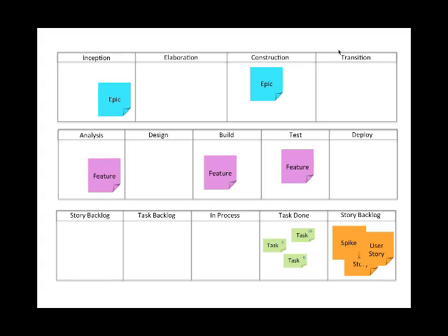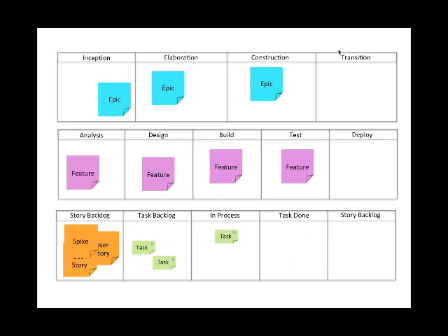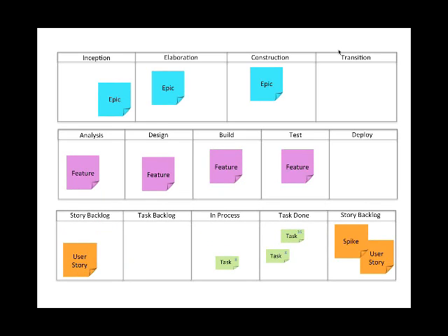Now here's the kicker, and this gets into the whole theory of constraints play behind Kanban. I'm very aware of the fact that I'm running out of time here with you guys, so bear with me. So what will start to happen is, as this system starts to fill up, and as we're getting a continuous flow of epics across the top board, as we're getting a continuous flow of features across the middle board, as we're establishing stable velocity, if any one of our Scrum teams and our many-to-many relationships becomes a bottleneck, that very clearly is going to put a feature into a blocked state. And then if the feature stays in a blocked state long enough, it prevents other features from moving into that state and ultimately creates a stop the line kind of condition within our overall system.